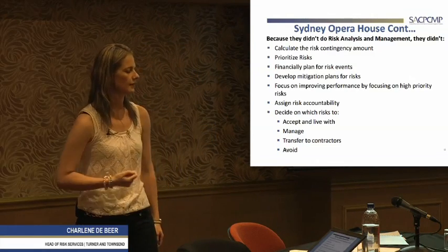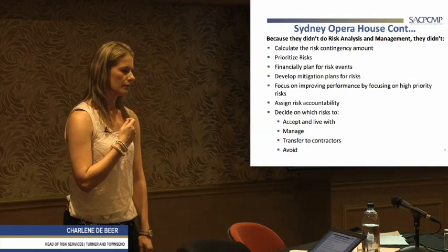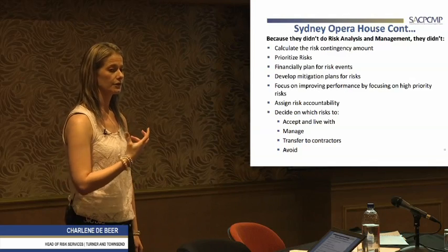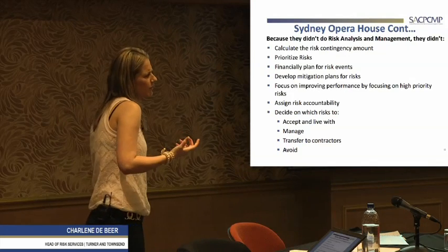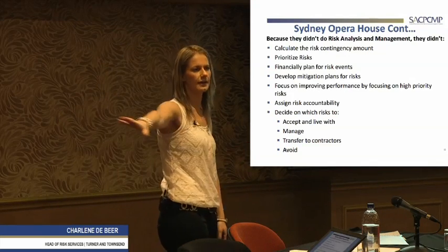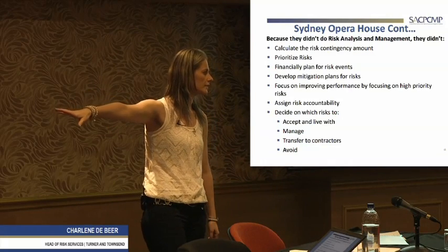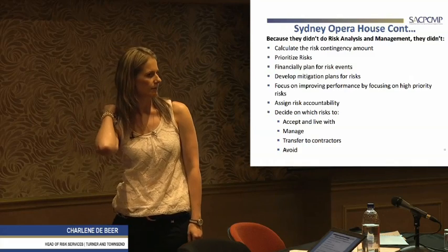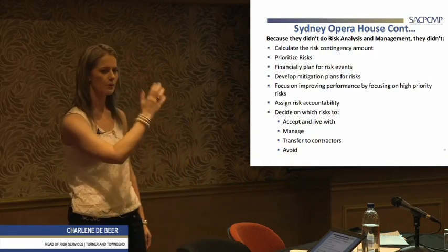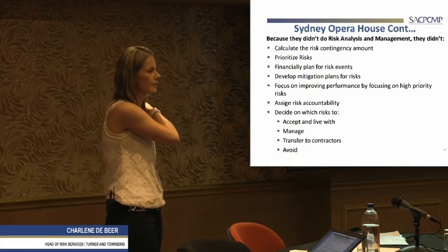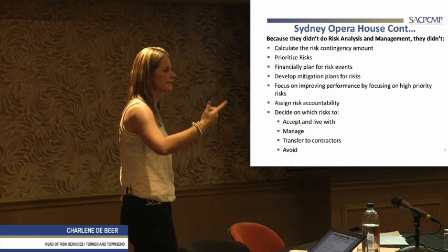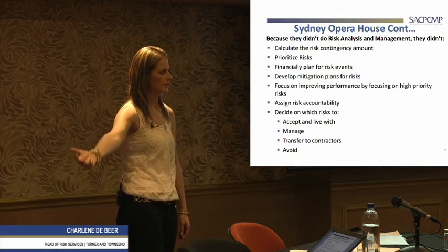So at the end of the day, you as a client will still feel the impact thereof. Maybe not to a very large extent. Maybe not always financially, because you're just going to say it's the contractor's risk, he's going to pay for it. But you might have reputational damage, because you might have promised investors or the country you'll have this up and running by this date. So you'll have reputational loss. You won't be able to capitalize. Capitalization, you can't claim back from the contractor.